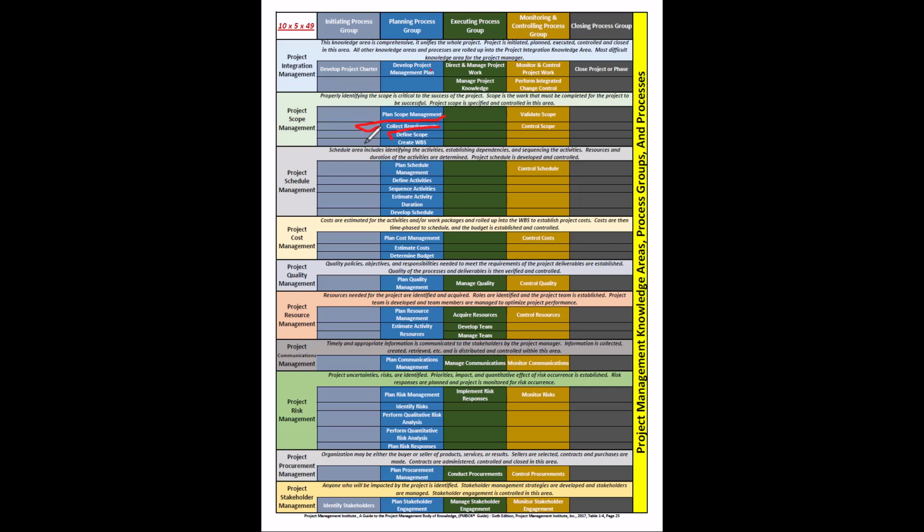It's going to have things like milestones in it, perhaps carried forward from your project charter. It's going to have a detailed description of the deliverable. It may have some exclusions in it. This project does not include, for example. It may have some risk. It may have some constraints in it, such as was in the project charter. But it's a comprehensive text document.